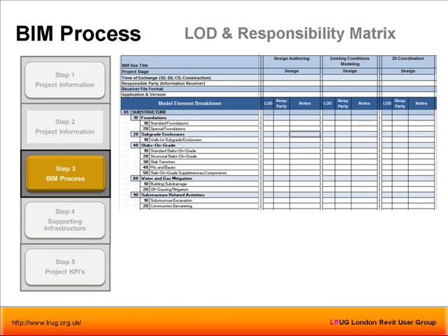Yeah. Okay. LOD. We capture some of the LOD descriptions and the important thing is the authorized use. When somebody says, "Oh, I'm modeling my floor slab at LOD 200," what is its authorized use, or what can it be used for? So that's important, and I put all the question marks. I'm not saying that 300 could be used for visualization or scheduling. It's only you can tell when you're modeling, or you can decide as a team that my 300 floor slab would be used for scheduling or something else.